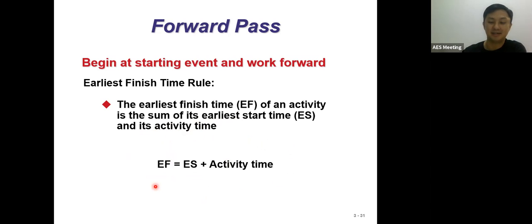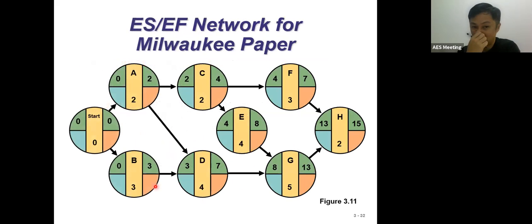Now let's see the following. For your understanding, I will demonstrate how this works. Looking at activity A, where is our predecessor? The predecessor is start. So 0 plus 0 is 0, and this 0 is brought forward to activity A. With activity A's early start 0, we add the activity duration 2, and we get an early finish of 2.